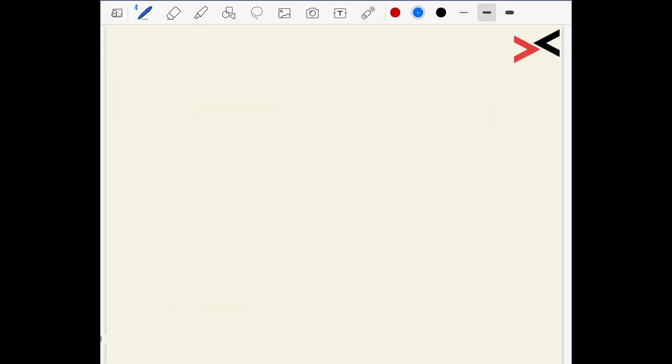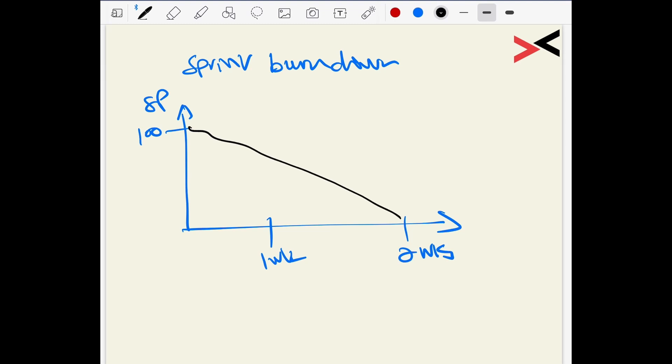The other one that we can work on is the sprint burndown. The sprint burndown chart basically takes the current sprint and says, okay, how many story points did you start off with? 100. So you have one week here, and you have two weeks over here. That's when the sprint finishes. Ideally, you need to go straight and that's how you're going to finish it.